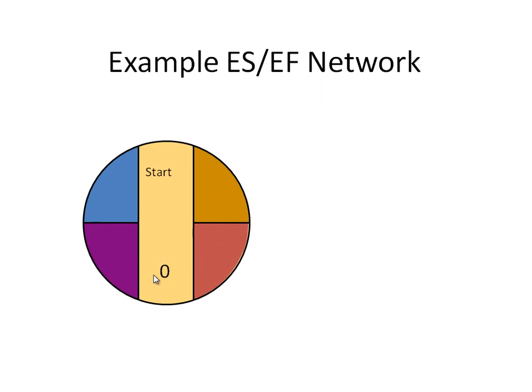So let's start, and with the start node we have 0. You can use a start node, or you can create the network diagram without a starting node. It doesn't matter, but this is just for organization purposes. I would like to start with a 0 node, 0 duration. So the name is start. It has 0 duration. Early start is 0. Since the early start is 0 and the duration is 0, 0 plus 0, the earliest finish is 0.